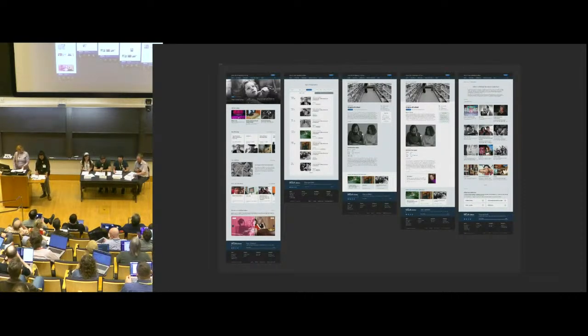Going forward, we need to concentrate on our communication. On our last project, the scope kept increasing bit by bit, which stretched our resources and timelines. We need clear priorities, only what's critical for launch versus what can wait. Yes, let's remember, you're now part of a larger library ecosystem.